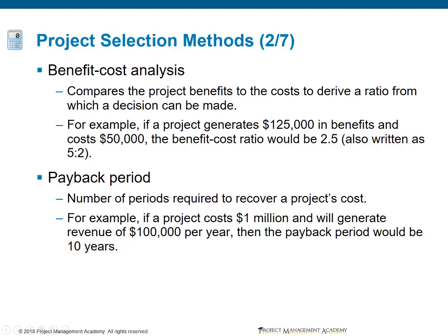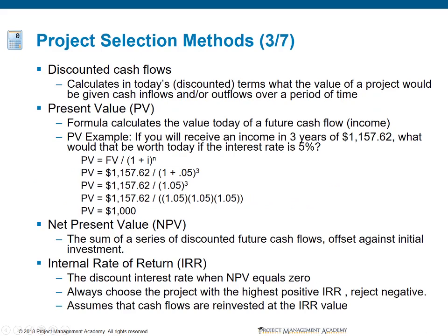If the primary focus here is to recoup that initial investment, then we always want to select the one that has a lower payback period. Again, this is looking at a single criteria to make a determination. If we were worried about money and schedule, we'd go back to a scoring model.